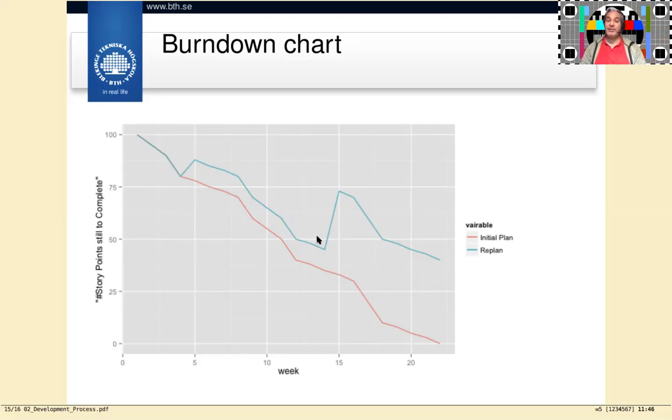So any of these things going up, or for that matter going down, if we suddenly de-scope a lot of story points from the current release, that is an indication, especially if it happens often, that something isn't going as we thought it should. And that means that we should go back and look at what really happened so that we'd avoid making that mistake again.